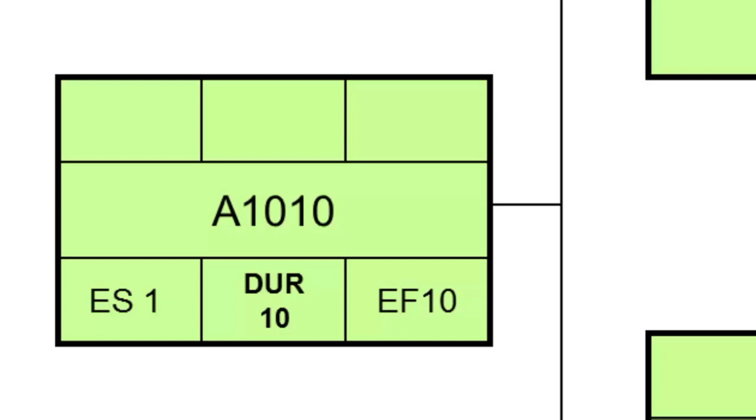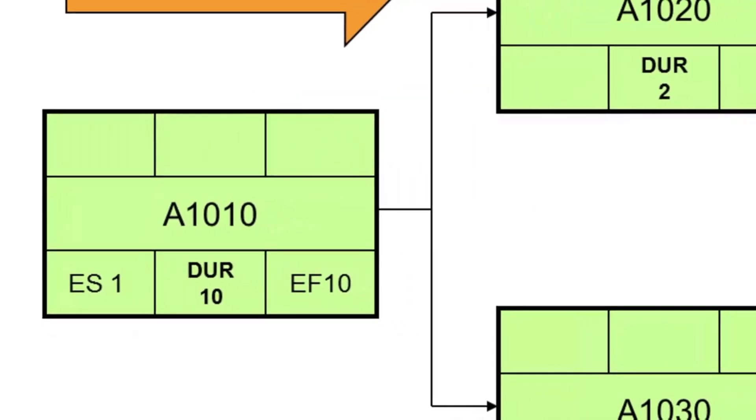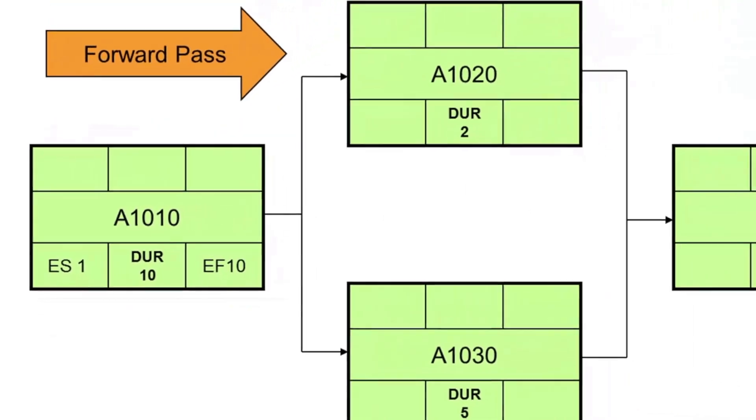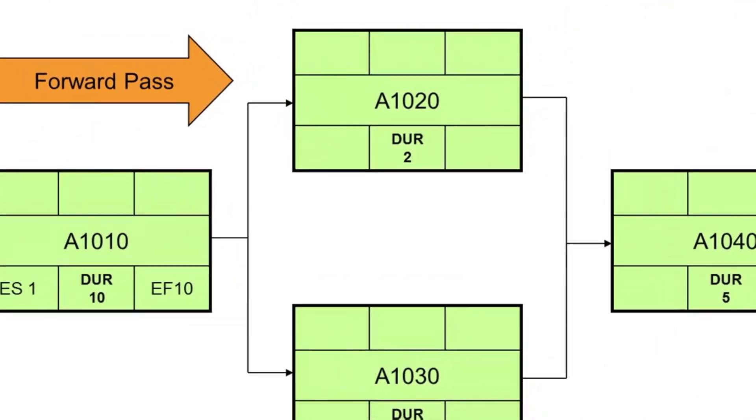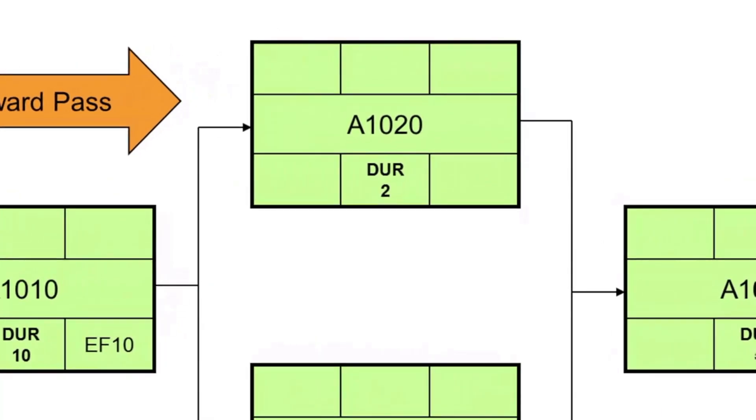Next, we follow the relationships and see that activity A1010 has two successors, A1020 and A1030. Let's start with activity A1020. Its early start date is day 11, because that is the next working day after A1010 finishes. It has a two-day duration, so it will finish at the end of day 12. That's day 11 plus two days duration, minus 1.